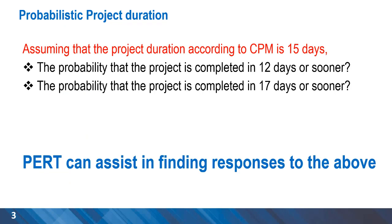For projects, we can determine the completion time using the Critical Path Method. An example here is a project with 15 days for completion. But we are interested in understanding the probability of completing the project sooner — for example, 12 days or sooner — and also the probability of completing the project in 17 days or sooner.